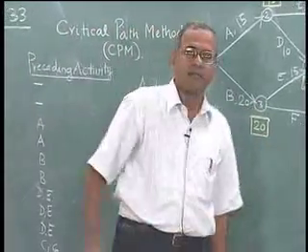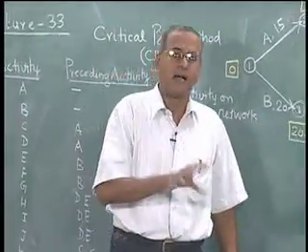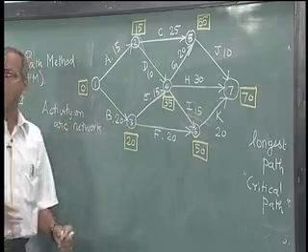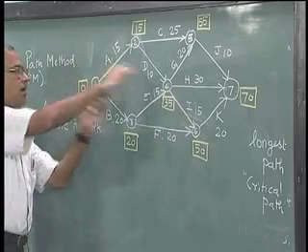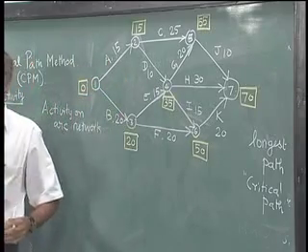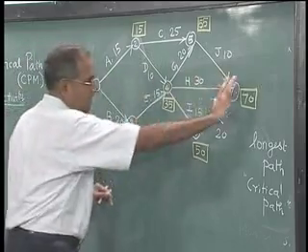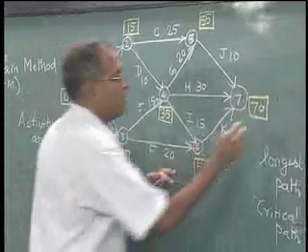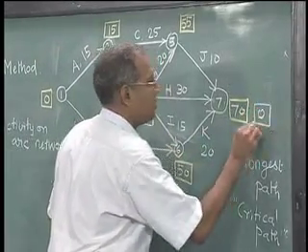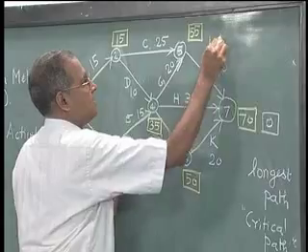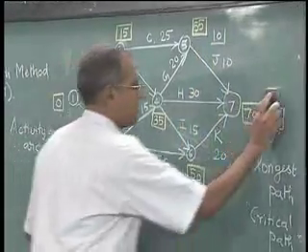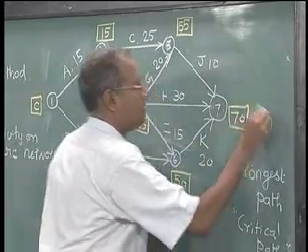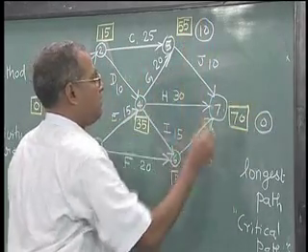In the critical path method, we would always label it as the maximum of the times to reach, because each node represents an event which is a completion of all the activities that terminate in that node. So, this is how the longest path is computed. We can actually do a backward pass as well. So, we can start with a 0 here. Now, this will be 0 plus 10, 10. We could use a circle here to show a different representation. So, you could use a 0 here, you could use a 10 here. Now, this would become